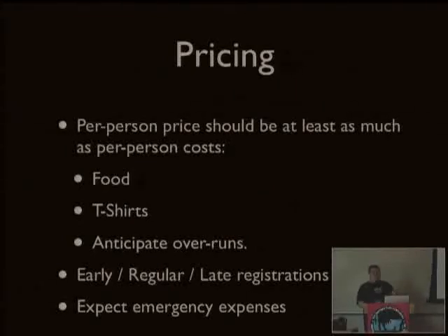I'm not saying you can't charge more than that. You should charge more than that, because you're going to have people that are going to come to your event for free. You're going to have fixed costs that you have to cover. But hopefully a lot of that you're going to be able to cover with your sponsors. But as a minimum, don't charge less than what your per person actual costs are.